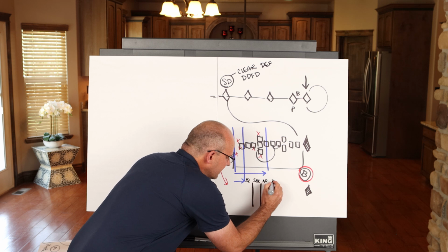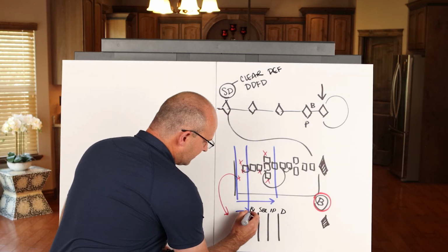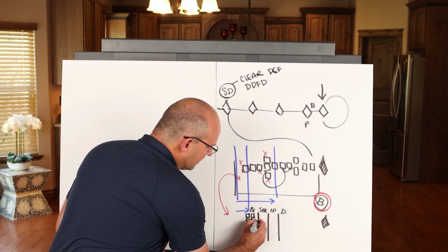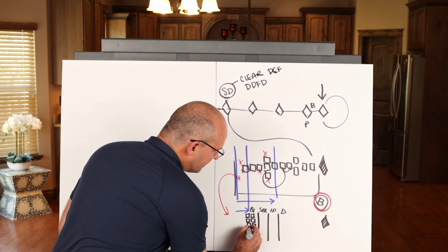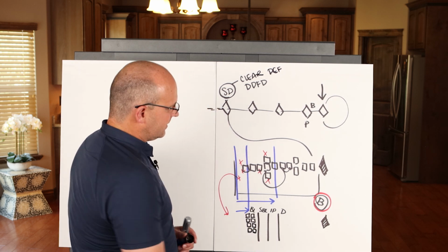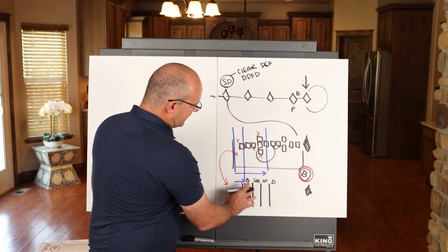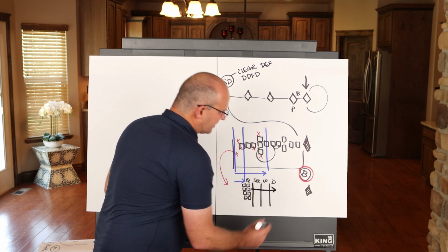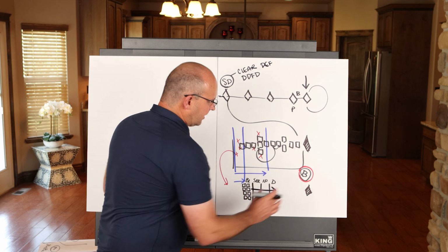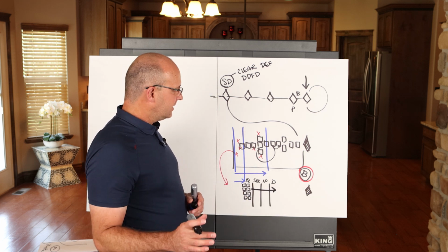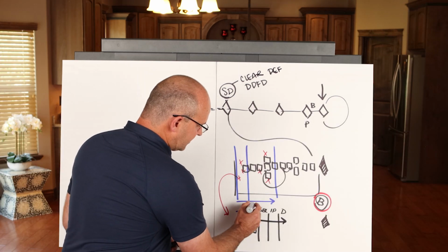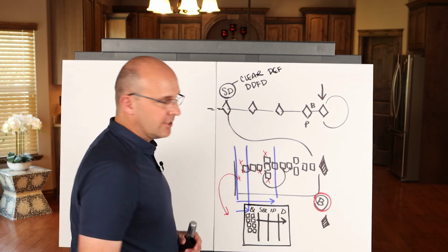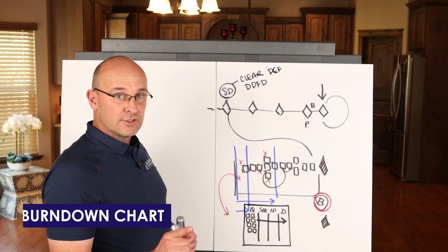in progress and done or complete, and literally make sure that all of the activities or stickies, whatever you want, or tags, whatever you call them, all of the design activities that need to be done, this could be for the whole phase or by discipline, are on your Scrum board, and move them in that direction every week as fast as you can up into the milestone. Now you're probably saying, Jay Money, how in the world can you take just a regular board with just a list of things to do and know if you're hitting your milestone? That's where your Burndown chart comes in.